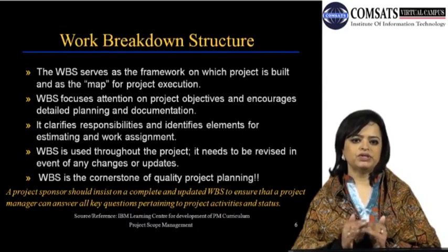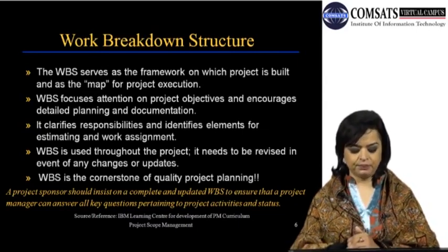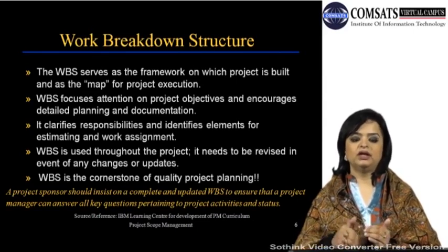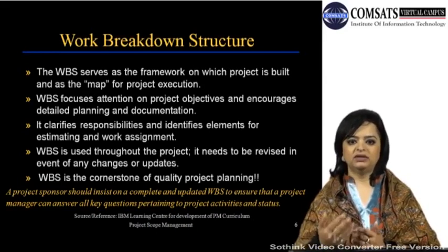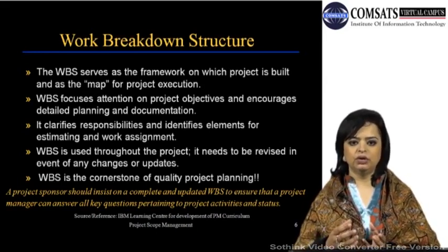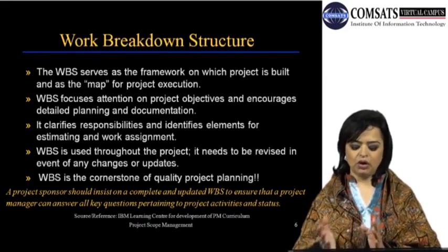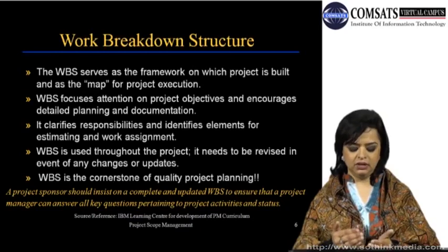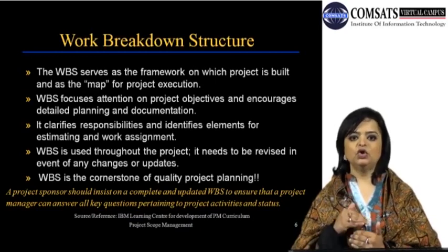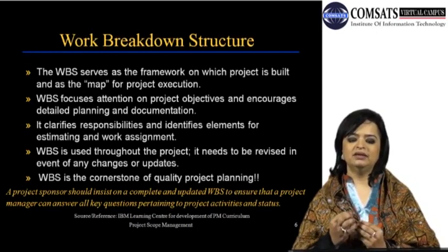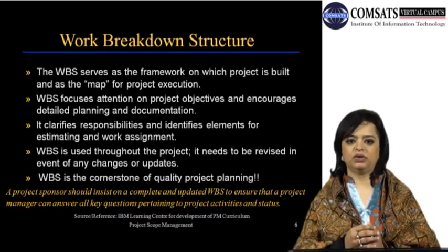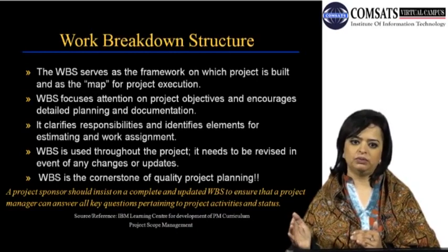WBS is used throughout the project, so it's a continuous and continual process. It needs to be revised in the event of any changes or updates. So when there are new changes that come up, new activities approved through the change control board, minor changes, major changes, all that will be added on, or if there are certain functionalities that will be deleted or minimized, then you will take those activities out of the WBS. No matter what is happening, it's a living and breathing document that keeps getting modified and updated throughout the life of the project, moving on until the closure phase of the project.